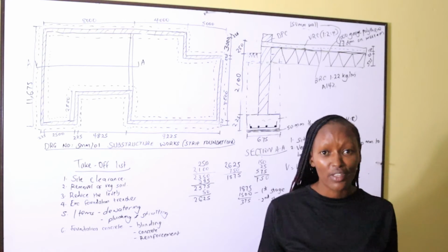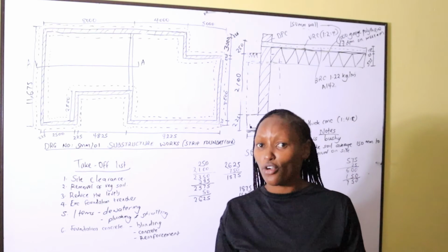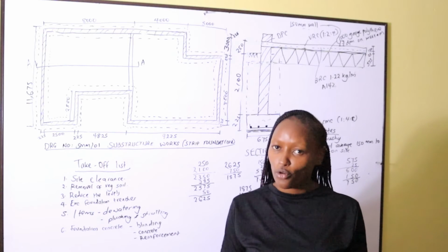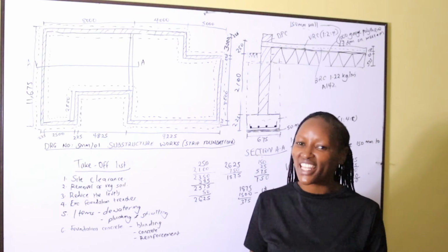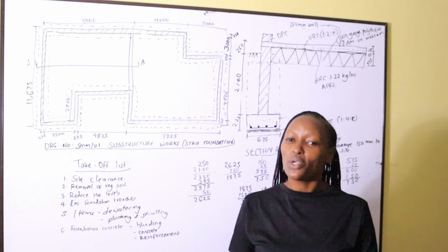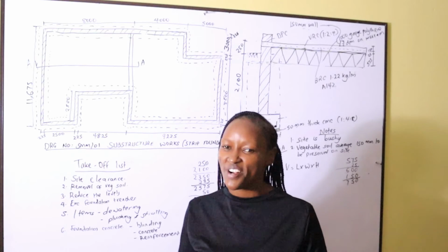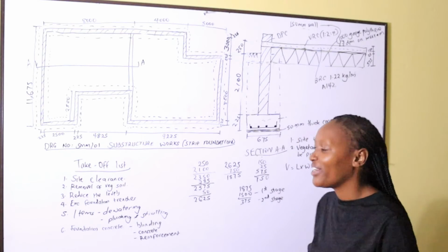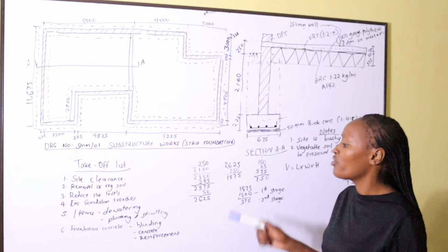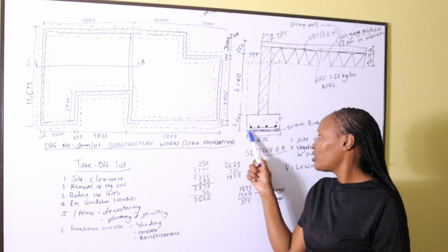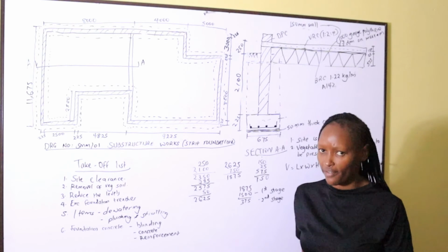The center line of the concrete is equal to the external perimeter of the concrete, from which we deduct the number of corners times the thickness of the concrete. How do we calculate the number of corners? The number of corners will be equal to the number of external corners minus the number of internal corners. Very good. You have understood that. So in the concrete, we shall take the center line of the concrete times the width of the concrete, which is 675, times the thickness of the concrete, which is 225, right?